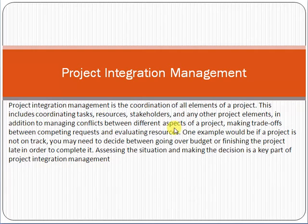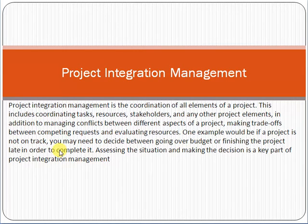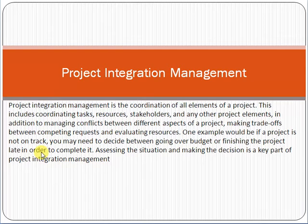For example, if a project is not on track, you may need to decide between going over budget or finishing the project late. There are two factors: one is budget and one is schedule. As a project manager, by assessing the situation and customer feedback, you have to decide whether to go over budget or accept the delay in the project.